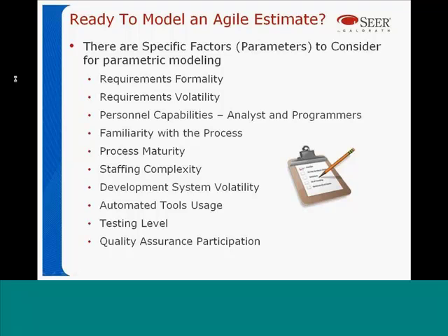In Agile, you're really trying to discover what it is you're building. You're not trying to build something based on a premise of how it's going to work early in the development life cycle. But you also are going to be looking at personnel capabilities, the familiarity of the process, and the process maturity. So is your staff really ready to be doing an Agile process, or have they done this before? Those are all different parameter values that may be affected.